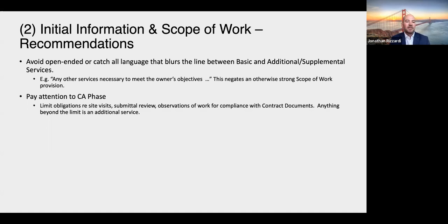So I frequently see it as to site visits. At the beginning of the project, the owner is probably feeling great about their contractor, but then, once the contractor is actually working, they're not feeling so great. And all of a sudden they're calling you every day to come out and take a look at what the contractor just did. If you've got a set basic services fee, that's a real problem in terms of the value of your time. So you've got to limit your obligation as to, and I've just listed a few there: site visits, submittal review, observation for compliance. And then anything beyond that's got to be an additional service.